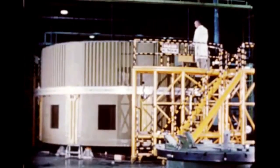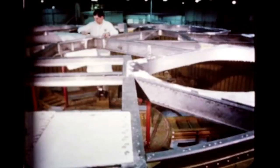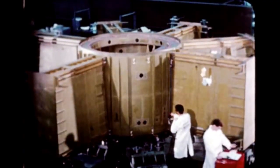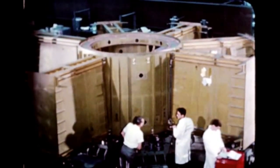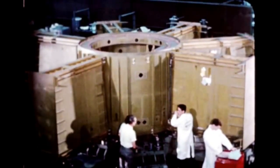S-1B3 tail section assembly was completed and build-up of the stage's spider beam began during the quarter. Stage fabrication is expected to be completed early next quarter and will be followed by tank clustering. Fabrication operations are underway for S-1B4. Build-up of the upper and lower thrust ring began in late October. Tank clustering is scheduled for late March.